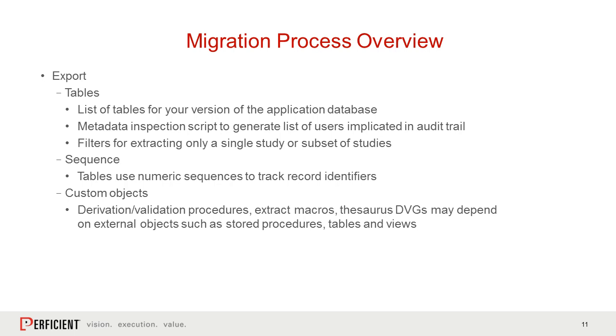And this usually involves putting together the scripts and sending them to the existing vendor, whoever's hosting the existing system. And then they review it. And typically in our migrations, they will actually perform the export. We don't get to touch the source system. We don't have access to the source system. We can only provide the scripts and instructions necessary to pull the data out. And of course, the owner of the source data will review those, and everyone agrees that this is the agreed upon process. So you need a list of tables.